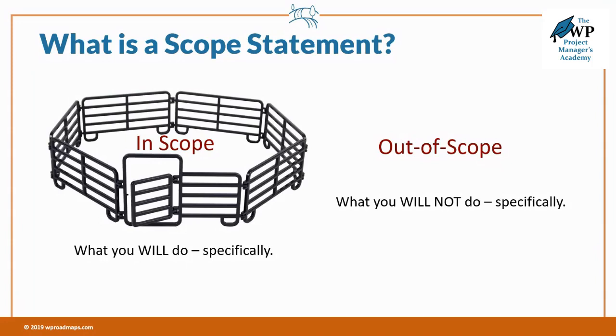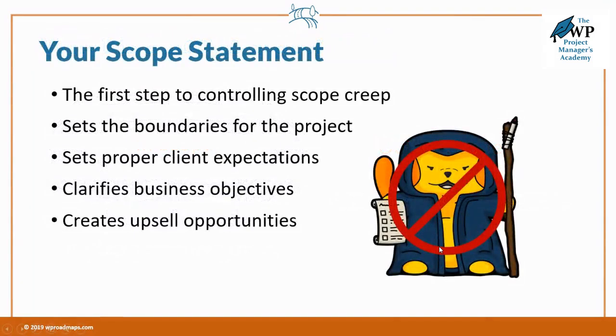This might seem obvious, but let's look at why your scope statement is so important. Your scope statement is your very first step to controlling scope creep. That section of your proposal document is really your proposed solution — this is what is going to be included in this project. It also sets the boundaries of where the project ends. Clients make assumptions; you may have told them you don't do content, but they just assumed you were going to do the content.